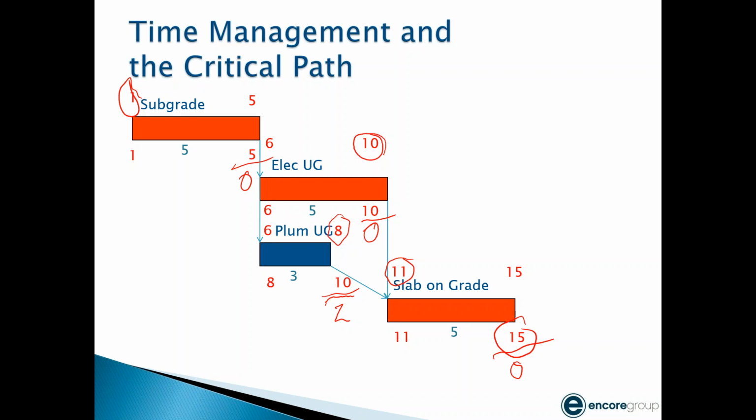So in order for these types of schedules, the critical path method, to be used for analyzing delays, typically you're inserting a delay into this logical sequence. Like you're seeing here, you insert a delay, it shows the impact to the end date.